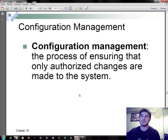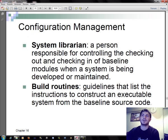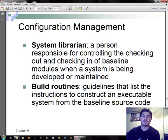Configuration management is the process of ensuring that only authorized changes are made to the system. Baseline modules are software modules that have been tested, documented, and approved to be included in the most recently created version of the system. A system librarian is a person responsible for controlling the checking in and checking out of baseline modules when the system is being developed or maintained. Build routines list instructions to construct an executable system from the baseline source code.